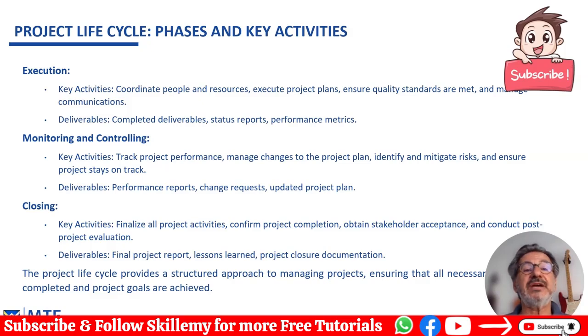Next, we have monitoring and controlling. Key activities here are to track the project performance, manage changes to the project plan, identify and mitigate risks, and ensure that the project stays on track. Deliverables: performance reports, change requests, updated project plan, if applicable. Finally, the closing. Key activities: to finalize all project activities, to confirm project completion, obtain stakeholders' acceptance, and conduct post-project evaluation. Deliverables: final project report, lessons learned, and project closure documentation.